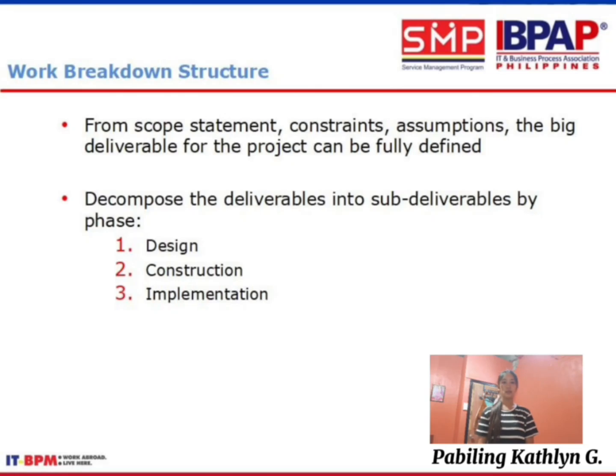Every project starts with a scope. To make it manageable, we use a work breakdown structure. We take that one big deliverable and decompose it into three logical phases. It is design, construction, and implementation.